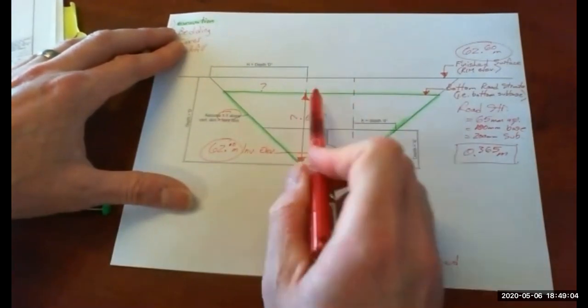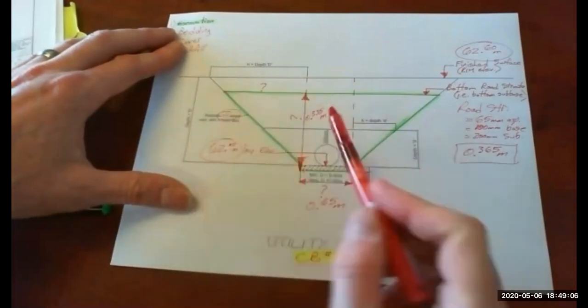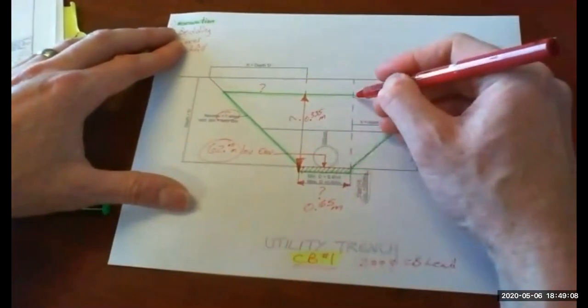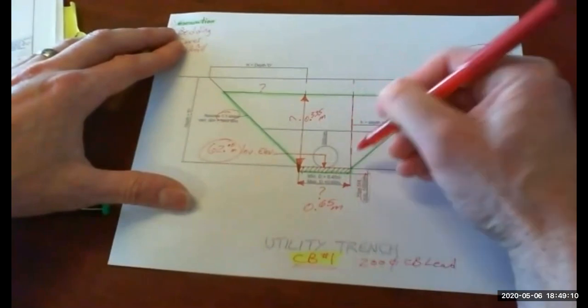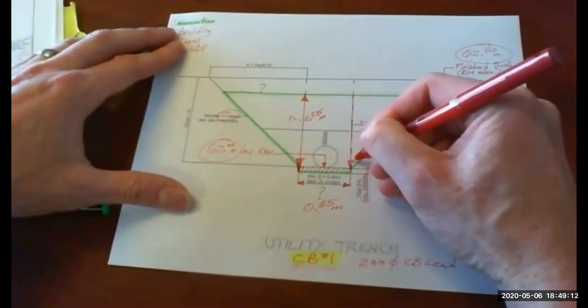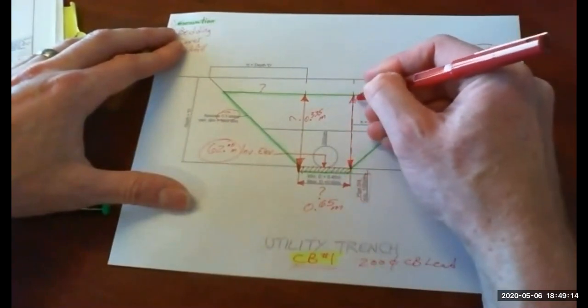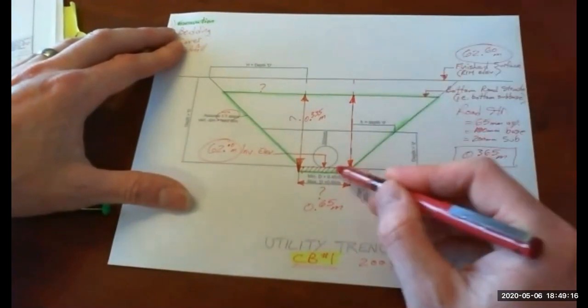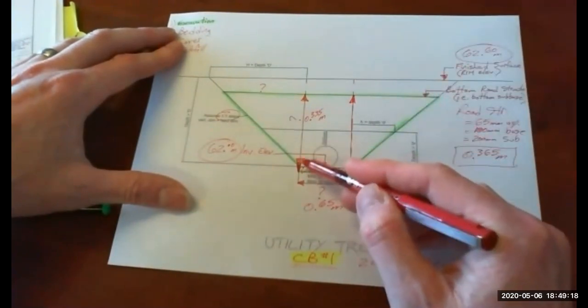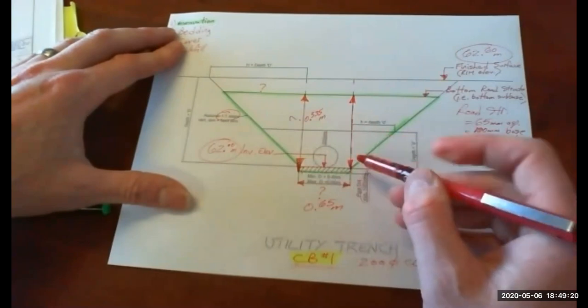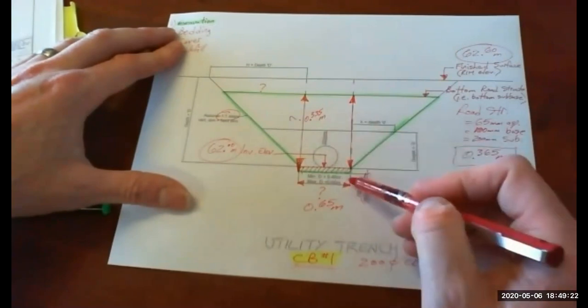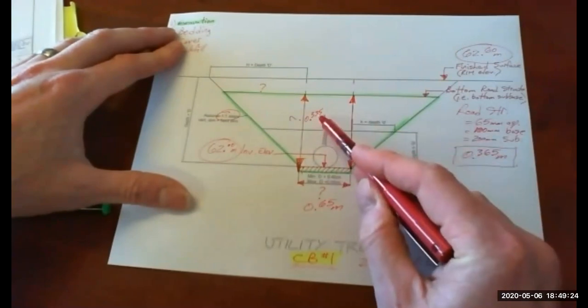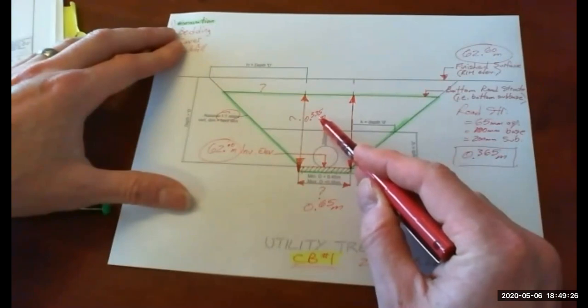So we can calculate that rectangle now. So then we need these triangles. So if I draw another dimension line over here, this now goes to the invert. That's what we used to have over here, but I changed it. So it's simply 100 millimeters less than that number. So it'd be 0.235.